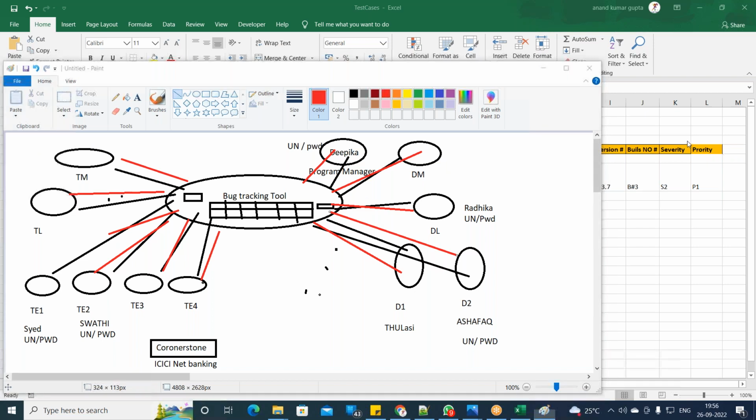Because they should also know who is working and what is going on with the project. Exactly. So for a priority 2 defect, Ashfaq needs to take 2 days. The program manager, dev manager and test manager will be tracking that. When they don't get the email in 2 days, they will go look at the defects and see it is taking more than 2 days. Then the test manager will escalate to the dev manager or program manager, and immediately there will be more pressure on Ashfaq.